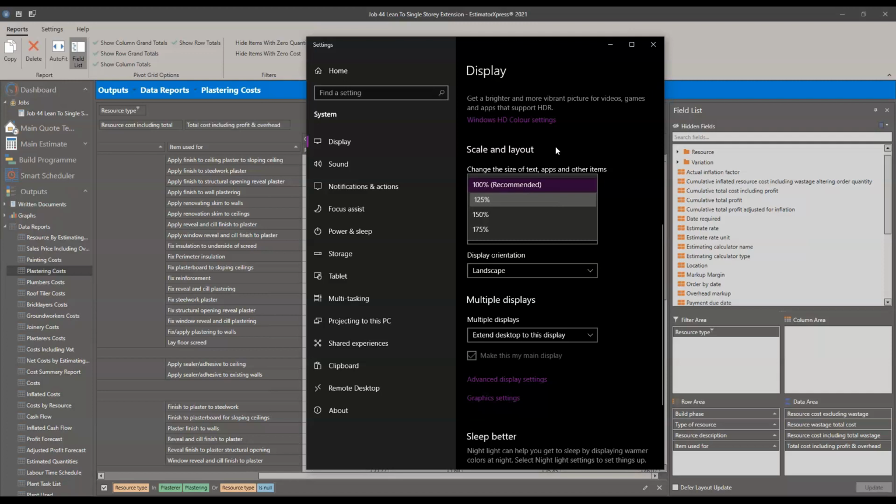It's particularly useful, much easier to use, if you have used a rounding tool beforehand to round up all the materials to their nearest whole item. Best done on individual jobs. If you're doing a group of jobs, don't round them, because you might end up ordering way more than you need, since a pack of bricks might finish off one job and start the next. You don't need to always be rounding. It's one of the reasons why it's not native, because of the number of people doing multiple estimates or multiple jobs in one place.